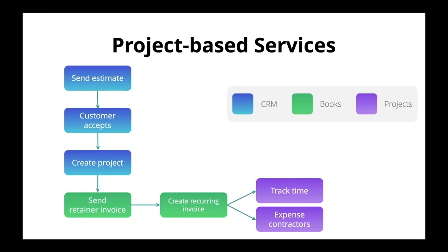And so by project-based, I just mean you're dealing with a project that is big enough and complicated enough that most likely you aren't going to be billing someone by the hours everyone has spent on the project. More likely than not, you would just say, all right, I can do this big project for you. Maybe it's a big construction project and it's going to cost you $200K. And so you pay 20% up front, and then you keep paying me 20% at a time until I'm done with the project.